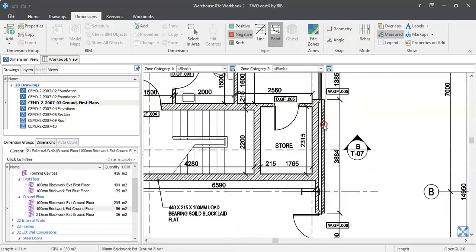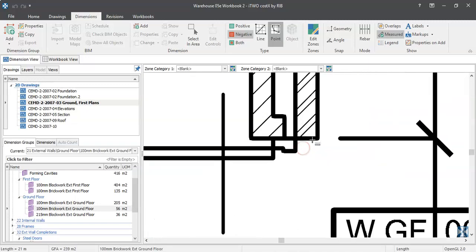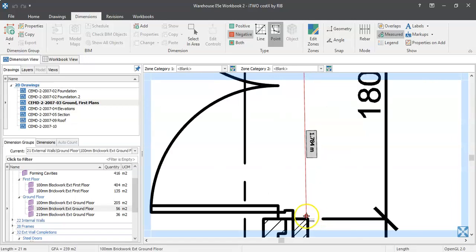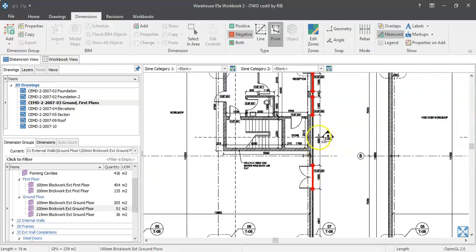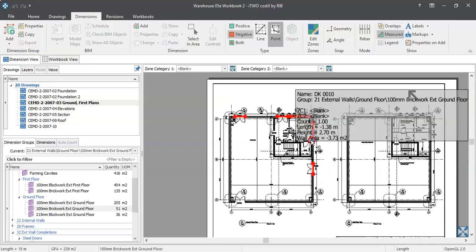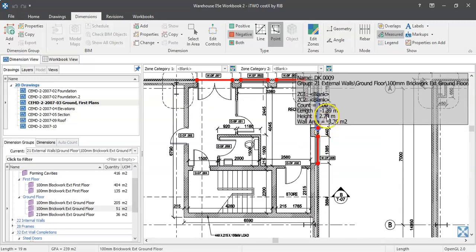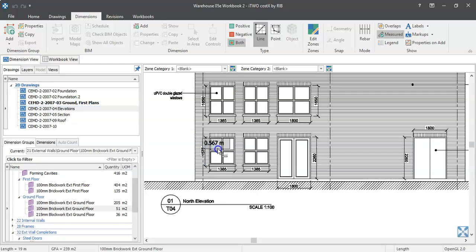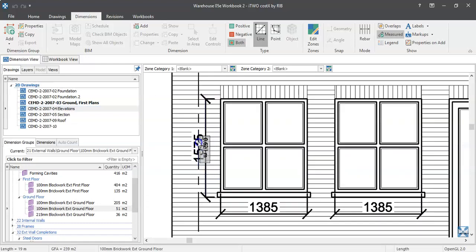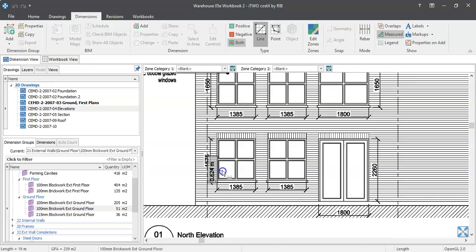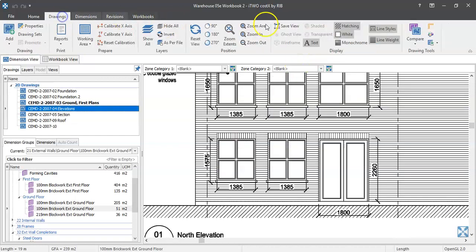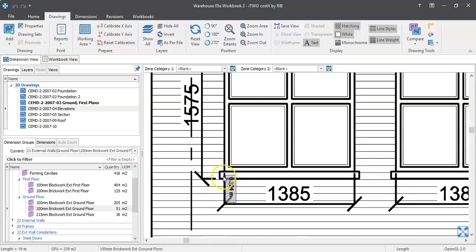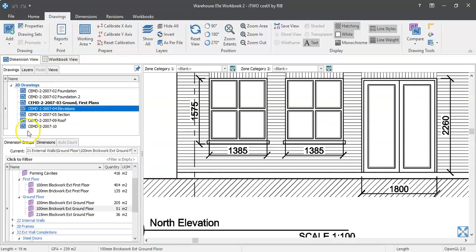From there to there. And do I have a door down here? I do, in my brickwork. From there to there. Okay, so I've deducted out the lines, but the problem is the height is incorrect. The height is still at the total height of the wall, which is 2.7, which is not the case. So I need to deduct out the appropriate height. I can't remember exactly what the heights are. Let's just double check. On the ground floor, let's take the 1.575. That's okay. Or if you wanted to be a little more accurate in terms of deduct, it probably is because I'm going to have my sill there as an opening as well. So do take the 1.75 and the 2.26.